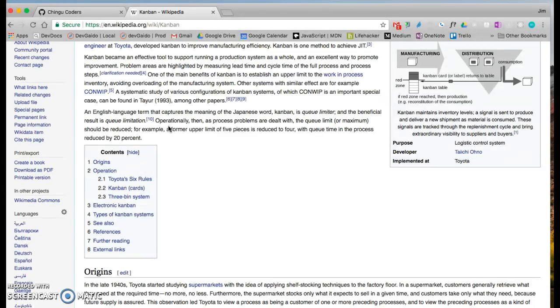So you'll start out with a backlog of tasks. Basically, those are things waiting to be done. Next, you'll have a column to show what are the tasks that are in progress. In the case of development, you might also have columns showing what tasks are blocked by something. For example, maybe the person who's assigned the task is out on medical leave, so the task can't proceed, so it's blocked. Nothing can happen until that individual returns.